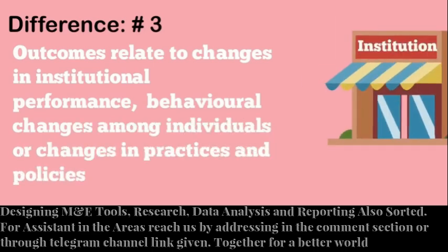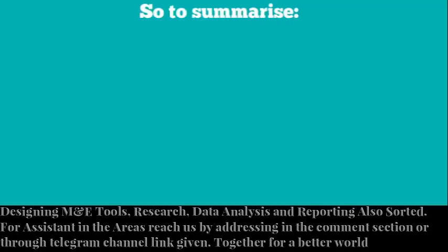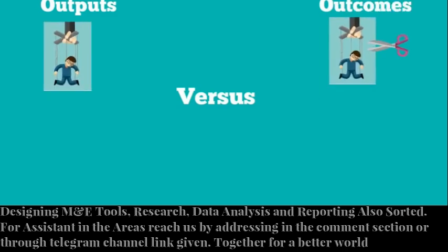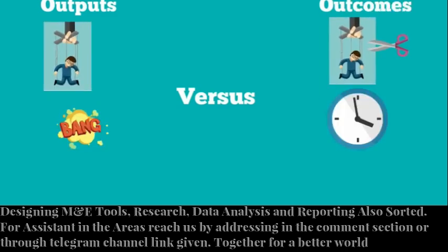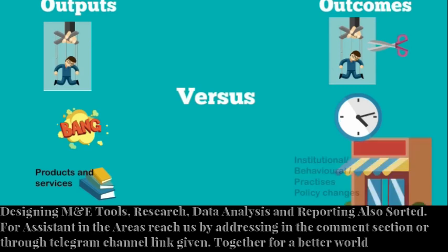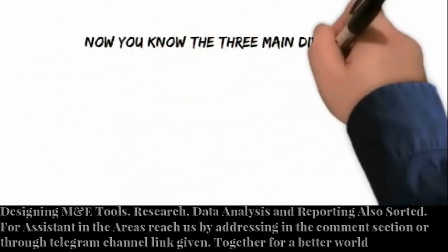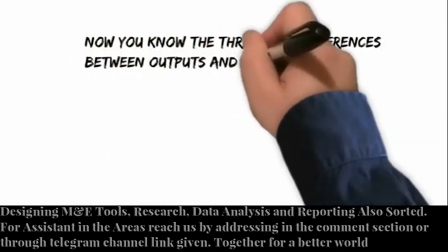The second way to identify outputs versus outcomes is to look at the scope. Are you focusing on a specific product, service, or deliverable? If so, that's likely an output. But if you're looking at the broader impact, the system, or the environment, that's likely an outcome. For instance, if your project is about developing a new software feature, the feature itself is an output. But if the goal is to increase customer engagement, that's an outcome.